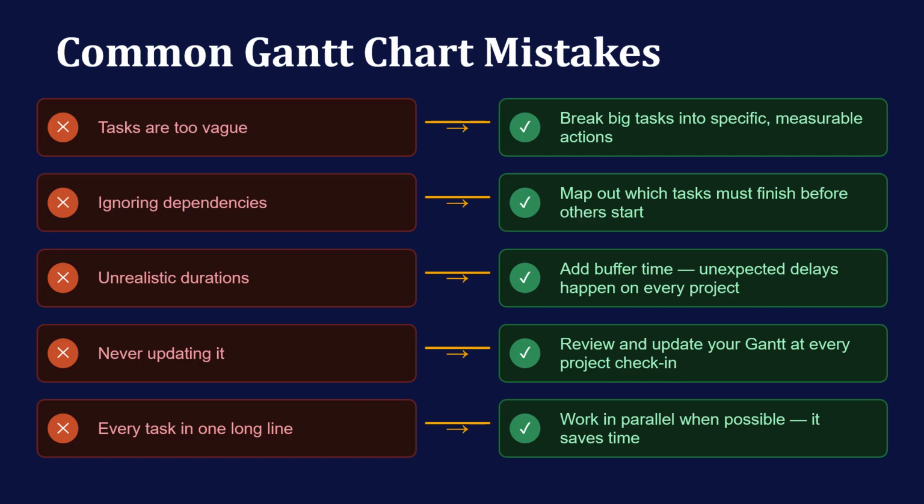Well, I know that you're going to need at least 2 hours to research and brainstorm. Ask the person who created the project, and you only spent 20 minutes on it. Okay, that doesn't work. That makes zero sense. So you want to make sure that you add buffer time for any unexpected delays, because that happens on every project. And then people get into sidebar conversations, right?